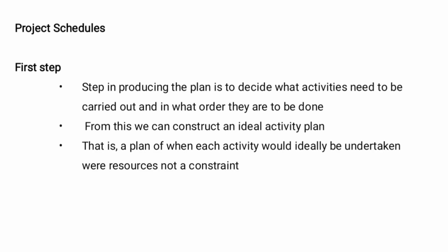Project schedule. Here there are three steps. In the first step, in producing the plan, we decide what activities need to be carried out and in what order they are to be done. From this, we can construct an ideal activity plan, that is, a plan of when each activity would ideally be undertaken, where resources are not a constraint.